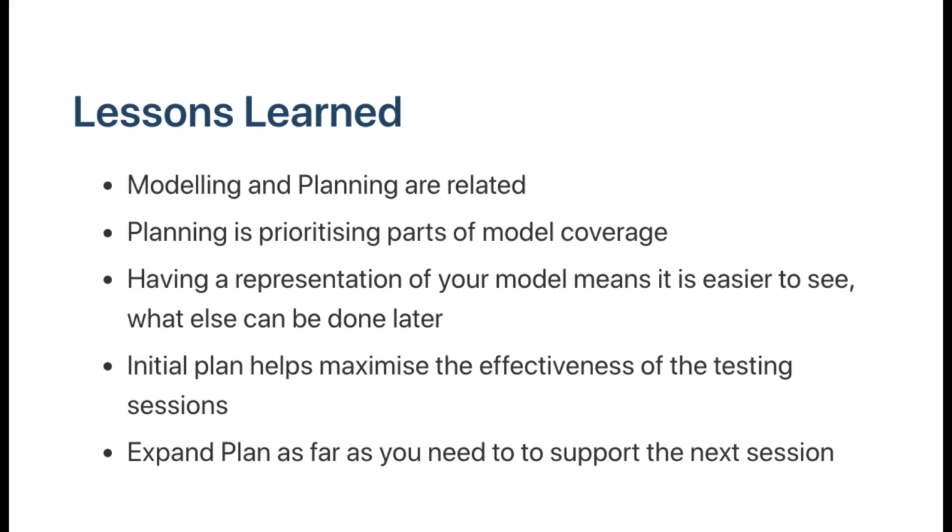One of the issues we had with old-fashioned structured testing is that we planned too far. Right? We planned in so much depth, we would spend months planning and create more plan than we had ever got time to implement. And then you'd have to go through planning sessions to scope down and deprioritize. And it was a mess. It was just a huge waste. Right? But that was what we did. But we over-planned.